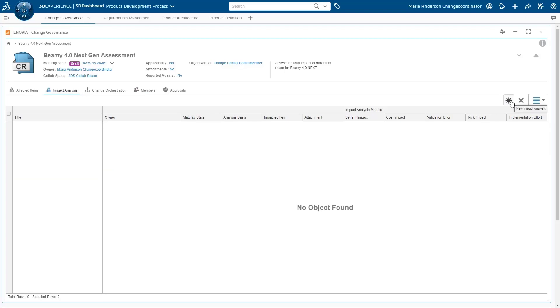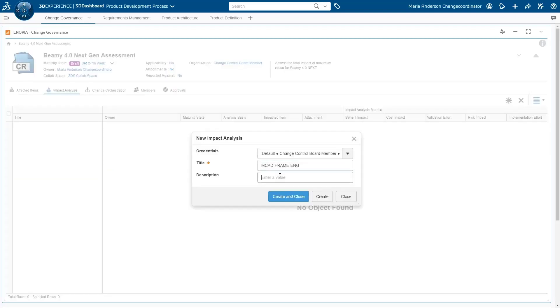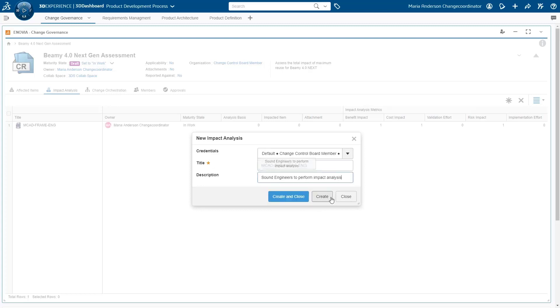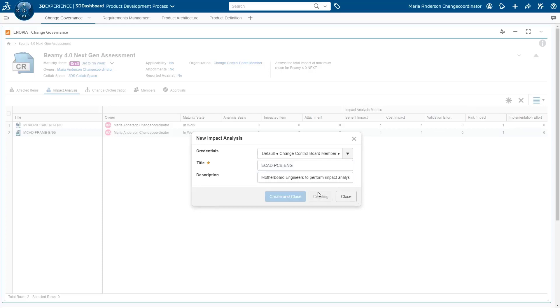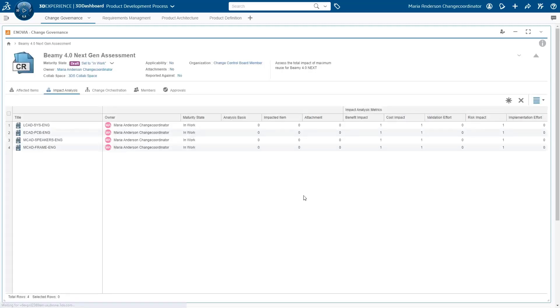As a change coordinator of a change request, you identify all impacted organizations and assign the relevant impact analysis action to help understand the full impact and effort of the requested change. This will ensure the change request is properly analyzed by the relevant functional teams.